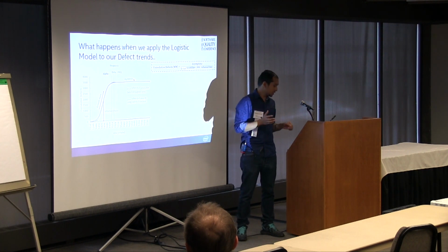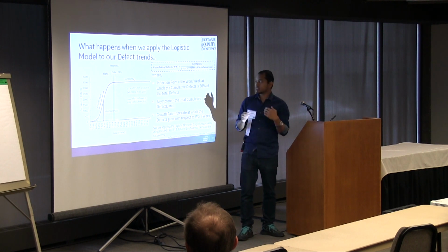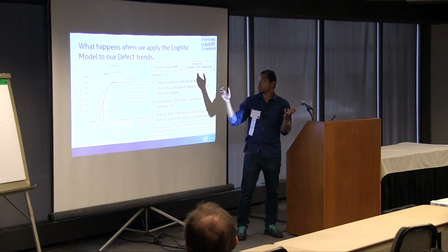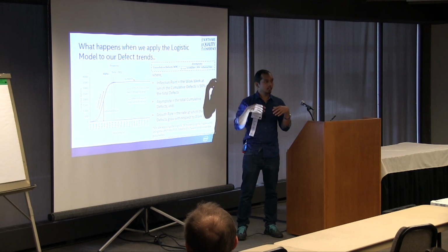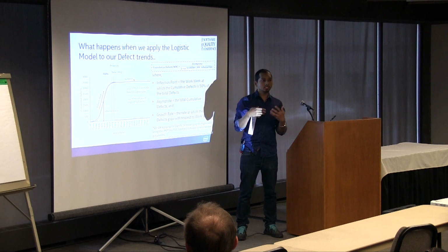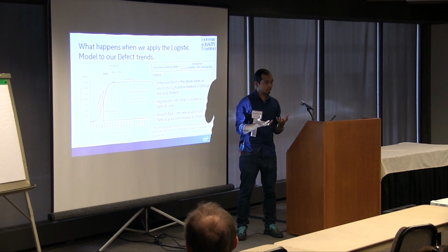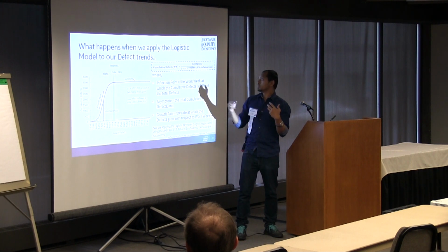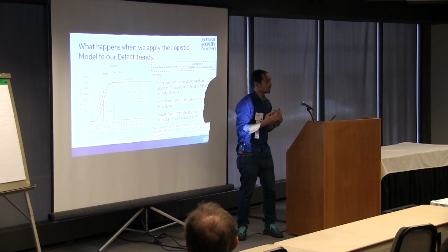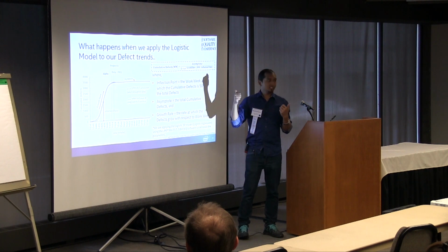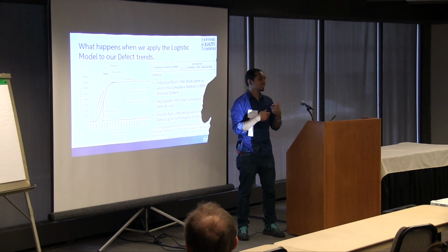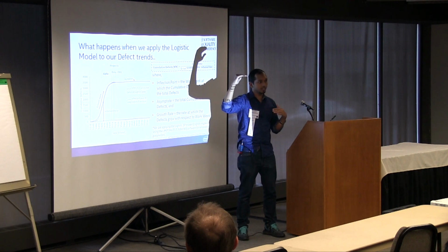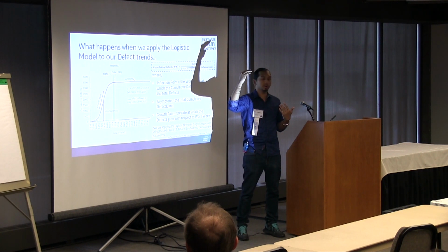So we are using R-square regression, and for that, the equation that you're seeing over here, the cumulative defects with respect to work week, is nothing but the same representation of the logistic regression function, but the parameters make more sense to us. Take the asymptote: it's nothing but the total number of defects. It's the peak. When we saw 3,500 defects, my asymptote was 3,500.